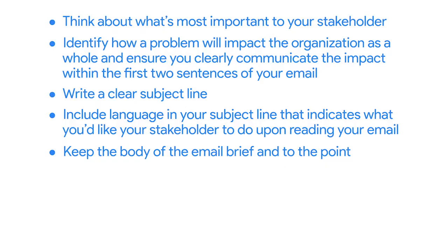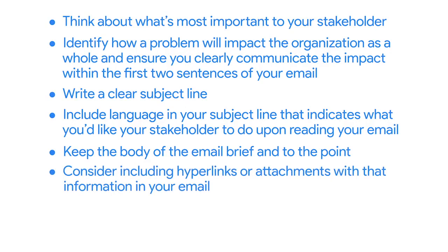That's it. Write 1 or 2 sentences that summarize your problem, along with another sentence that identifies how the problem may impact your organization's OKRs. If there are documents or additional information that your stakeholder might need to review to make an informed decision, consider including hyperlinks or attachments with the information in your email.